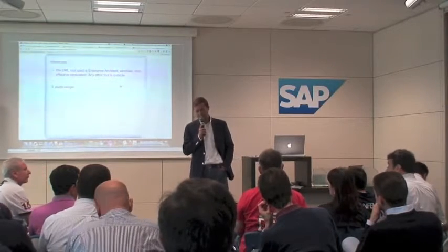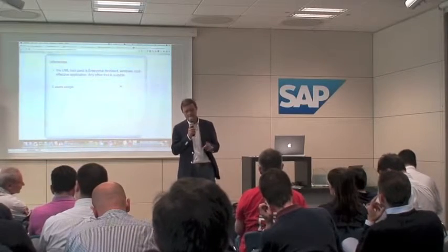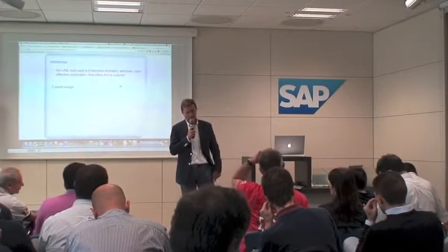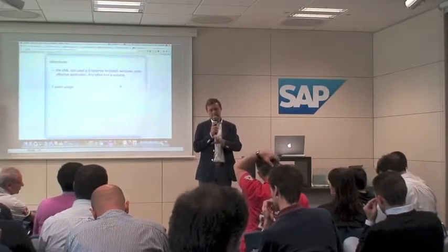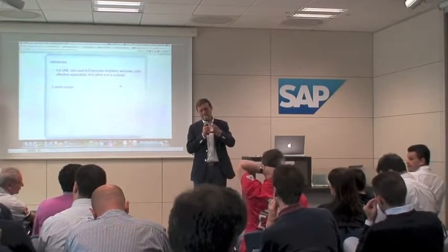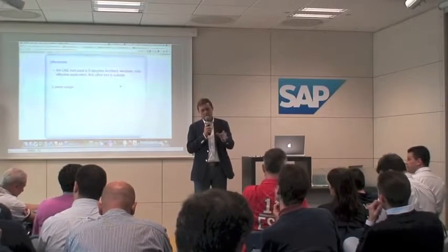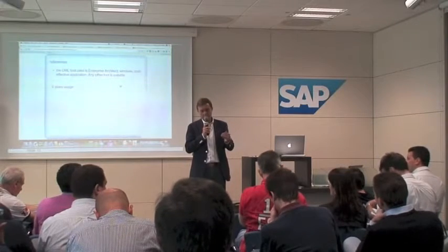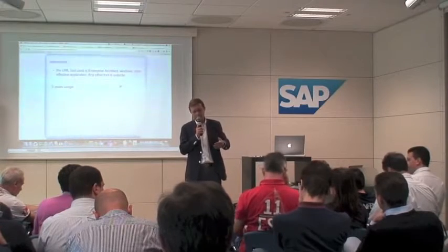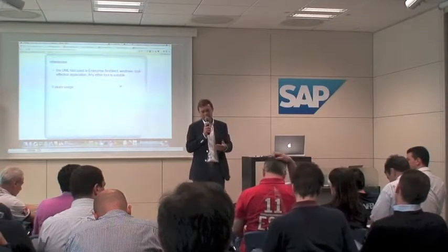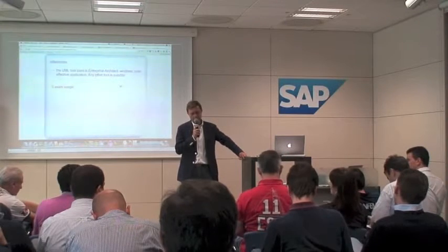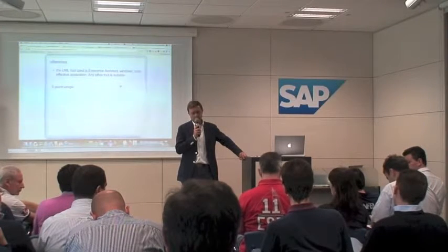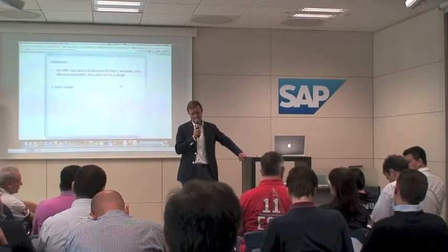Yes, usually we have a testing process. We perform a quality assurance session, a final quality assurance session with the users. They sign off the quality assurance document. And then typically we work with the external developer, but using this work item number, we check if all the change requests that are needed to put a single work item in production are there. So no, it's not automatic. No, it's always manual.